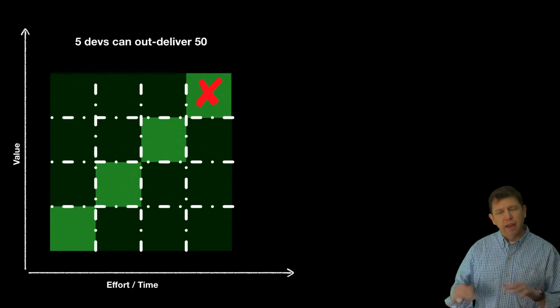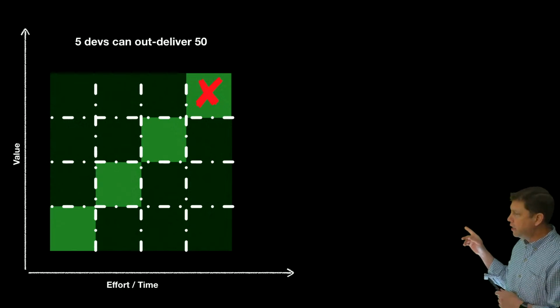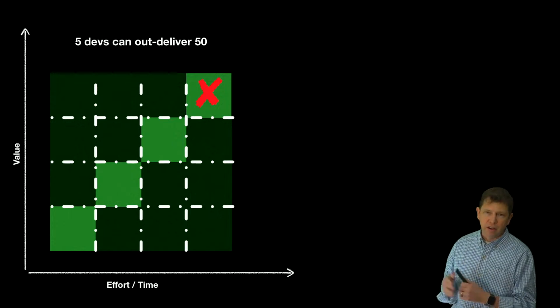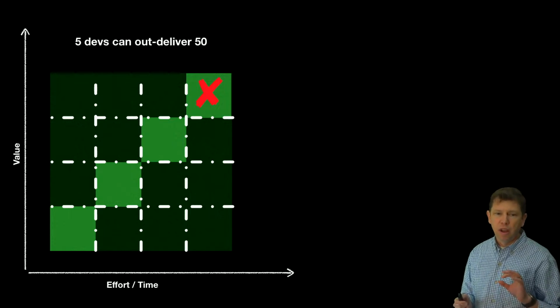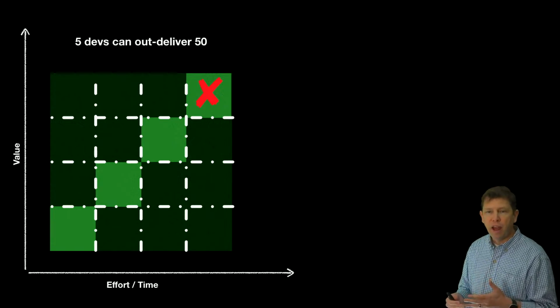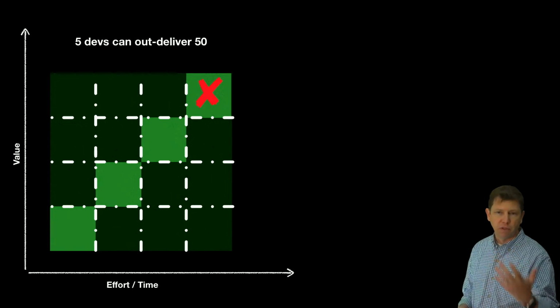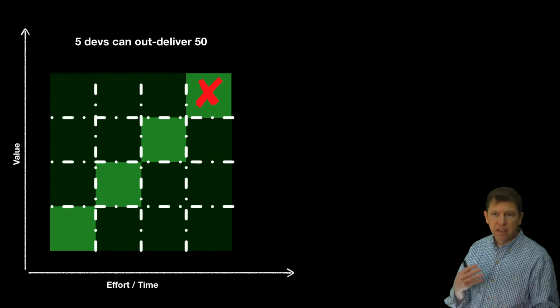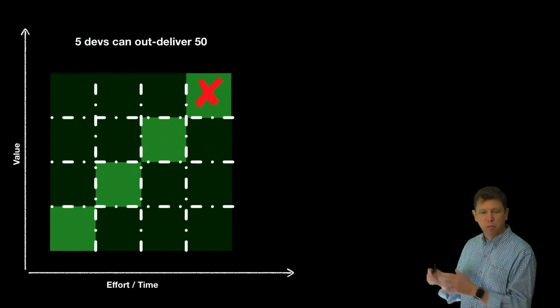There were lots of reasons, but a big piece of that was that we were splitting stories down in this way, which allowed us to get feedback more rapidly and allowed us to split things off. Sometimes we found that those things didn't need to be done or could be deferred until later. And we were able to get testing a lot more automated because we were splitting these stories up like this.